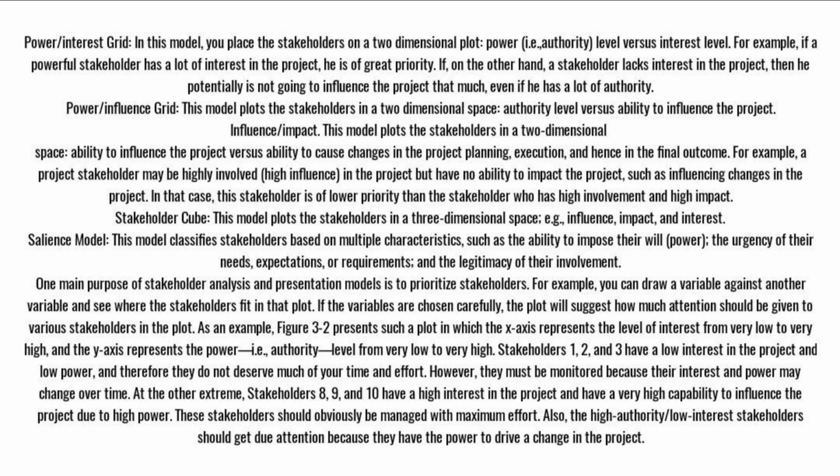Stakeholder cube. This model plots the stakeholders in a three-dimensional space, for example, influence, impact, and interest. Salience model. This model classifies stakeholders based on multiple characteristics, such as the ability to impose their will, power, the urgency of their needs, expectations, or requirements, and the legitimacy of their involvement.